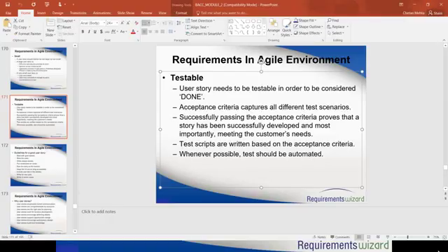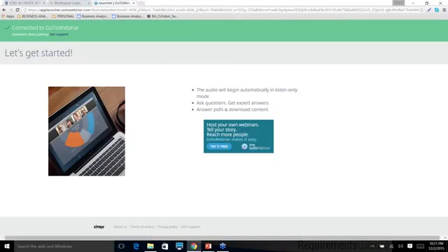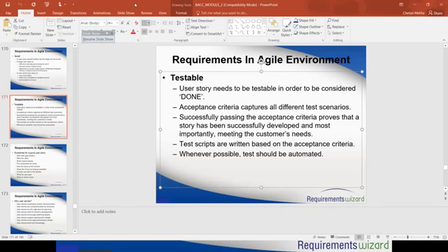The sprint planning is all about how many story points we can do in that particular sprint, right, Jason? Yeah, that is a topic we need to discuss in detail. That is called the velocity of the team. Have you heard of this term? Yes. So velocity is the capacity of your team to handle the number of story points you can do. And we'll talk tomorrow on that, because tomorrow I need to cover the sprint planning and the burn down and burn up charts.